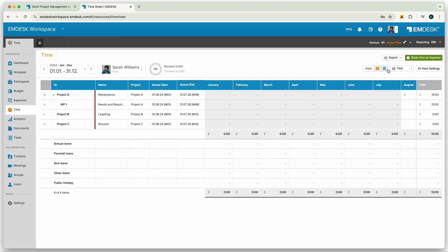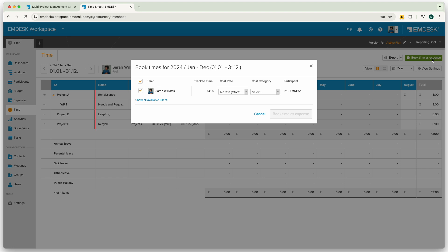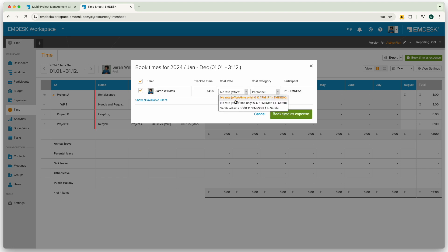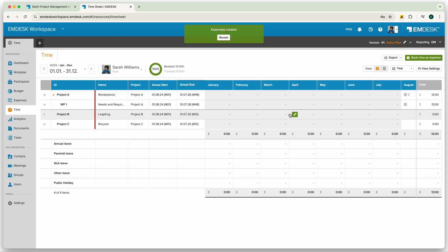Once a weekly or monthly timesheet is ready for approval, the team manager can convert the hours into expensed effort by clicking the book as expense button and selecting the right cost rate. You can then find the effort converted here in the expenses section.